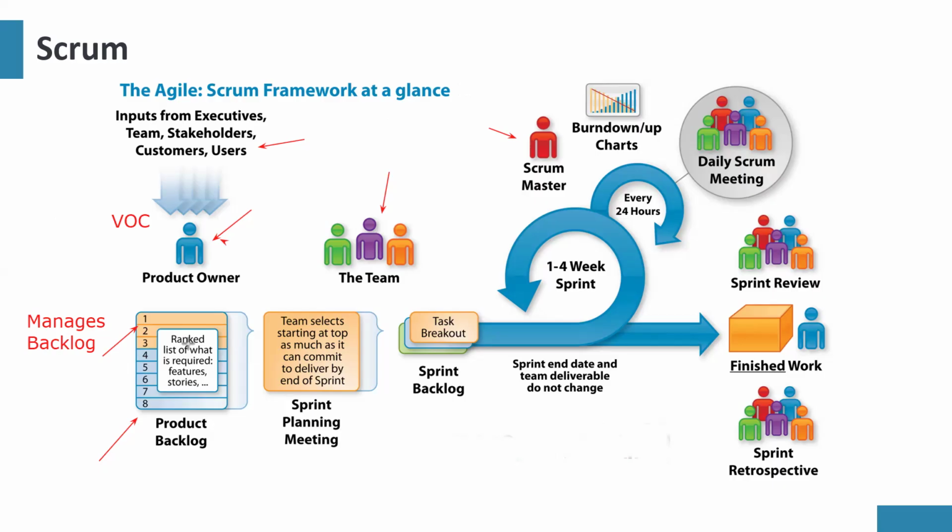Now, let me explain. Software development is quite expensive, to pay software developers to work on your project. The reason we put the most important things first is so that if we run out of money, the most important things have already been developed first. The other things can come later when we make more money. So that is why the product backlog has to be managed by the product owner to ensure that the most important things are done first and they're on top of the product backlog.